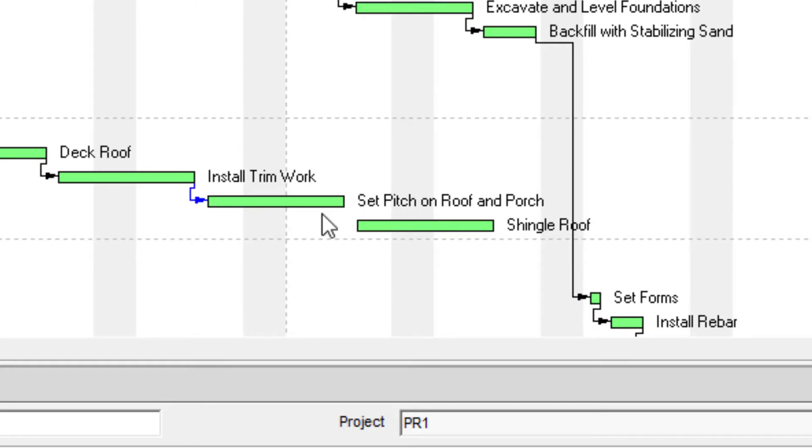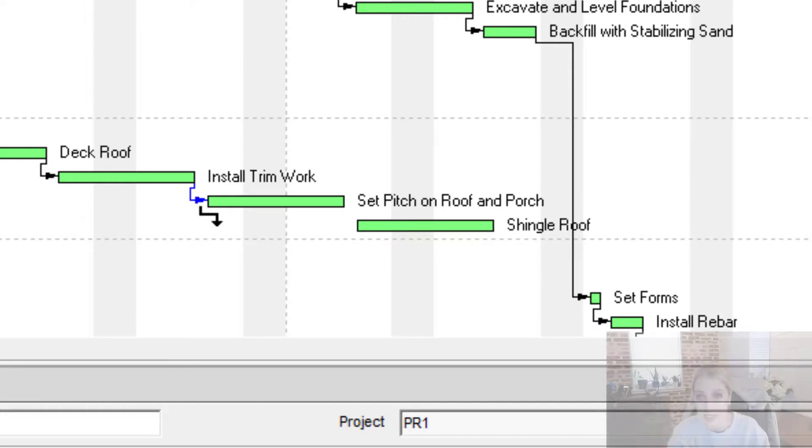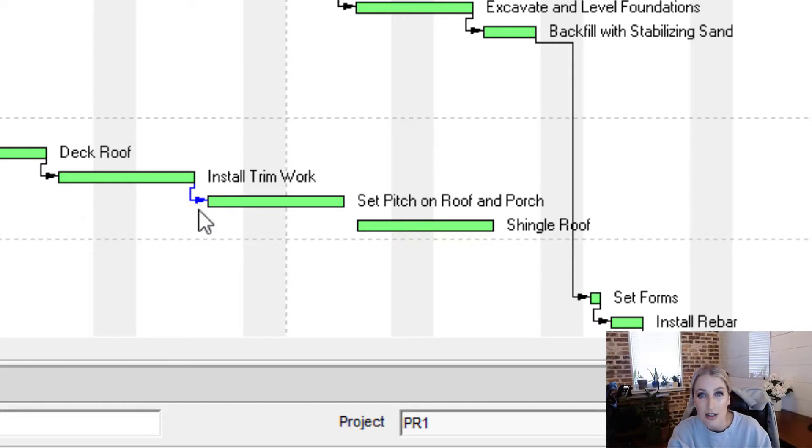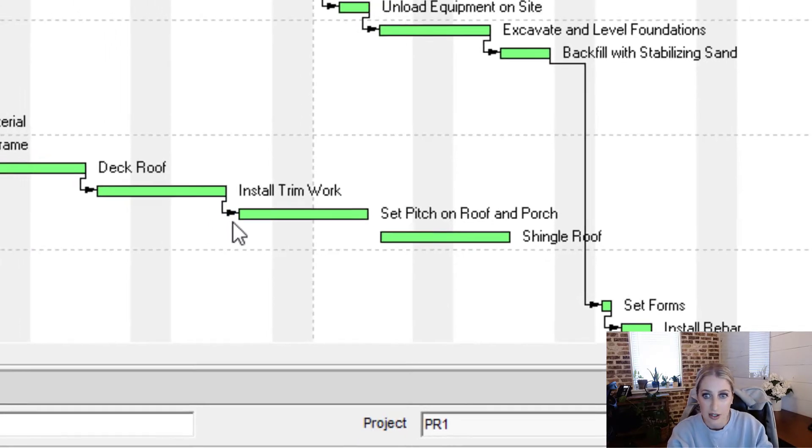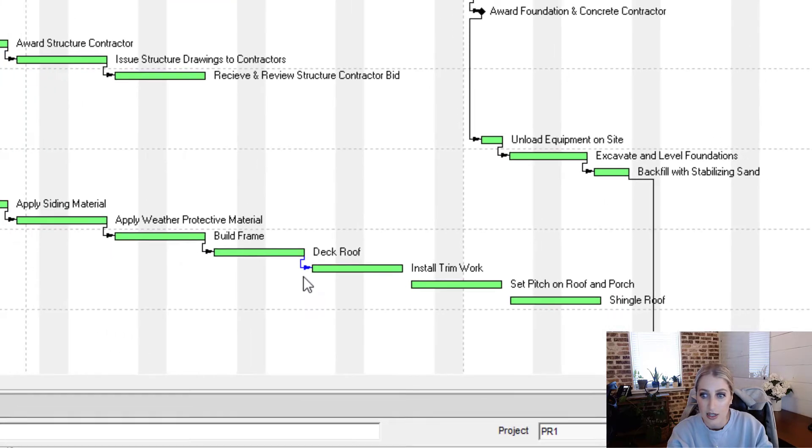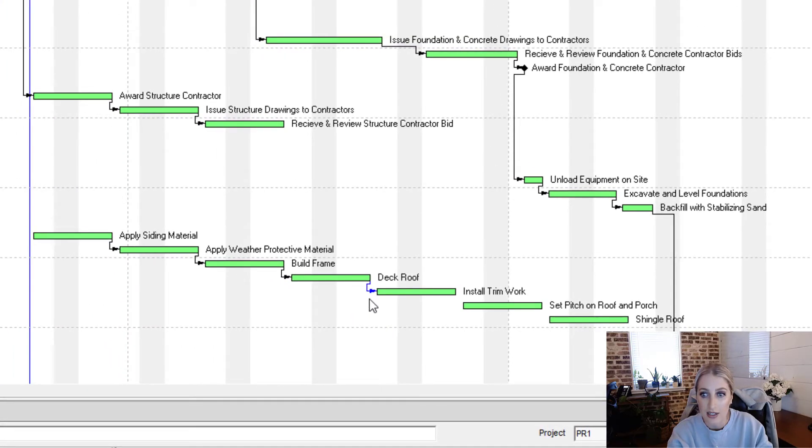And what's also happened is it automatically went and that blue arrow moved to the previous activity. So if we wanted to continue removing logic this way, we could just press delete, and then enter.